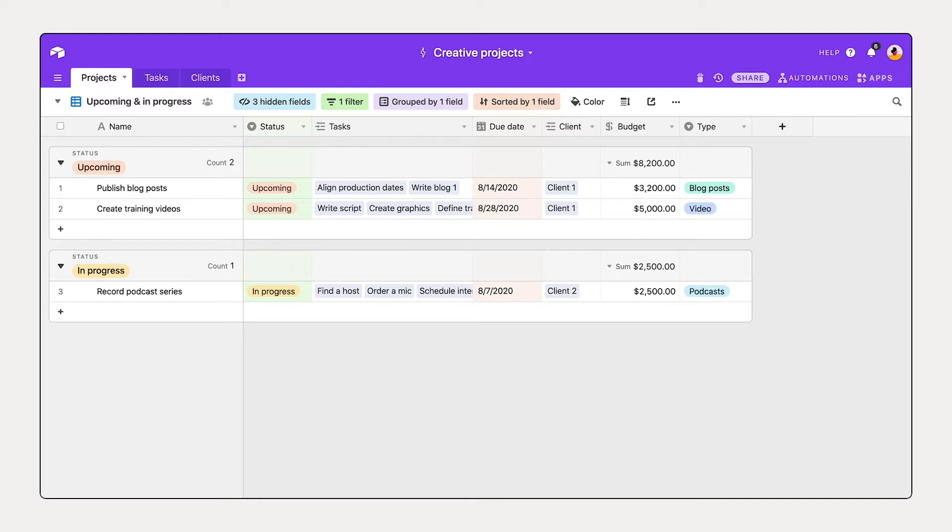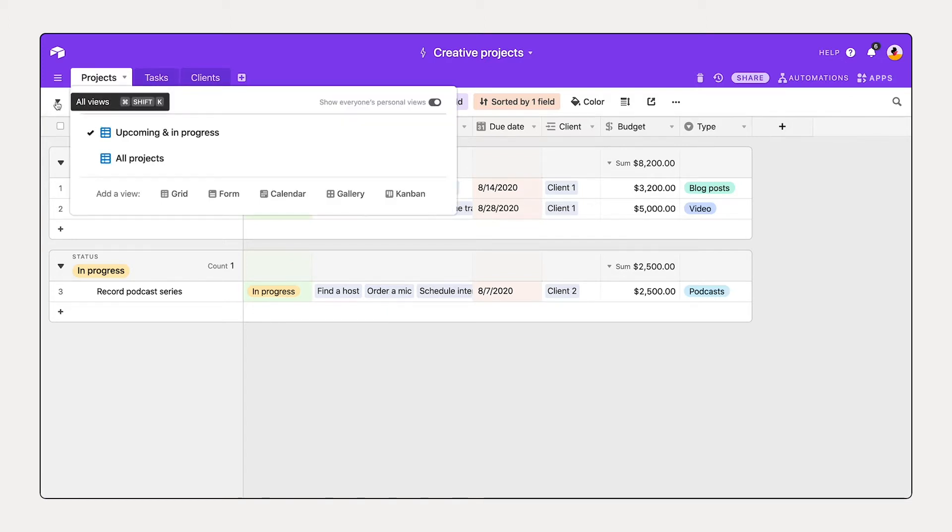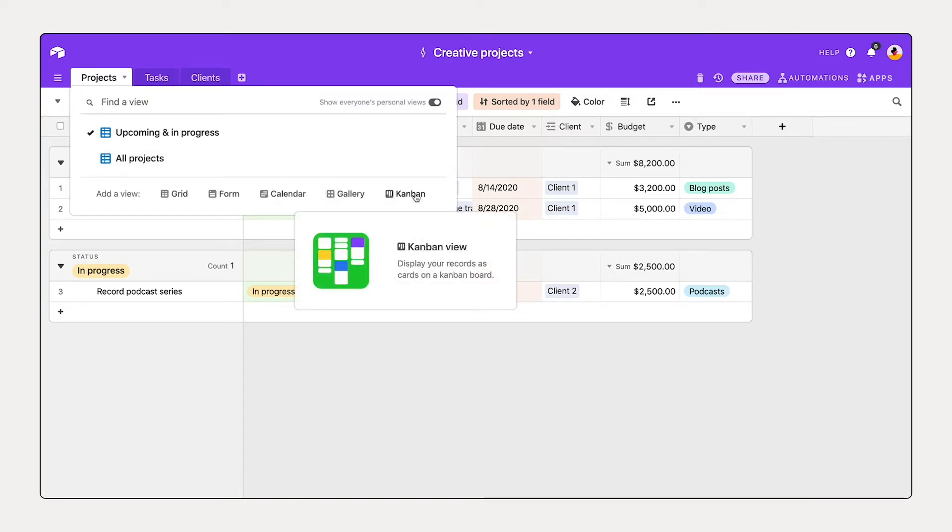For example, if you'd like to stay on top of the status or stage of your projects or initiatives, you can use Kanban view. To create a Kanban view, select the view dropdown, hover over Kanban.